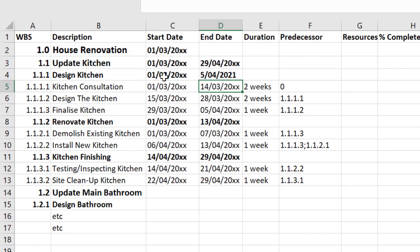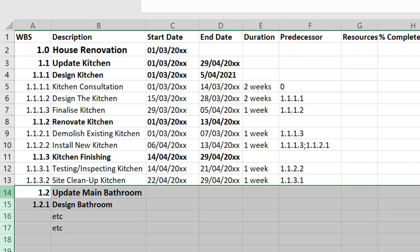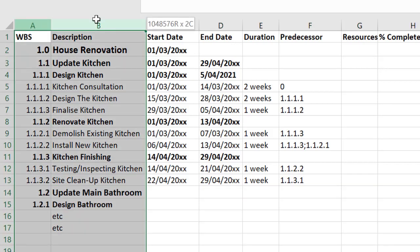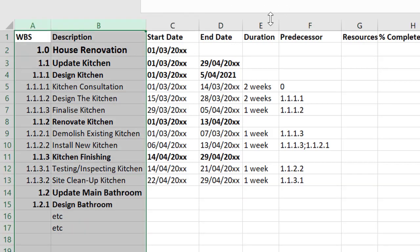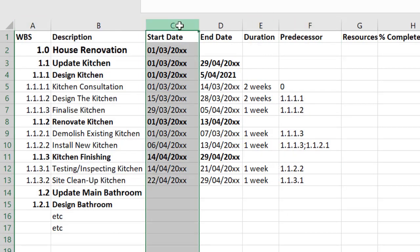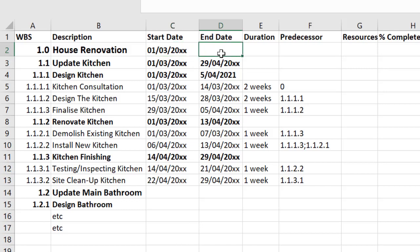So we do the same process going through all of the work breakdown structure within the orders given. So all of column A all of column B then all of column E all of column F then all of column C and all of column D. Once you've done all of that you'll have a start date and you can find out through that work breakdown structure what the end date is. Once you have those things then you can plot them as a bar chart and make it look more like a Gantt chart.